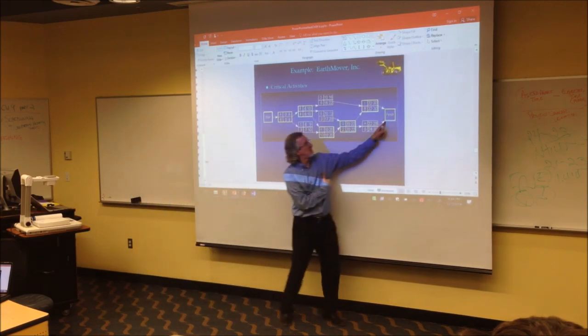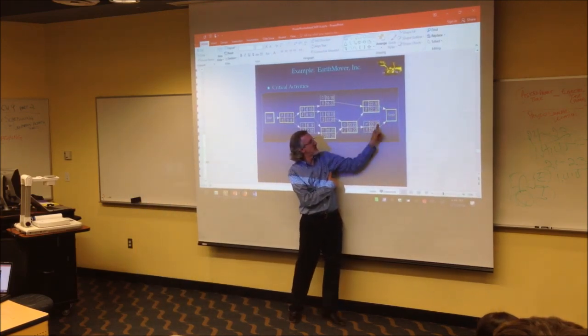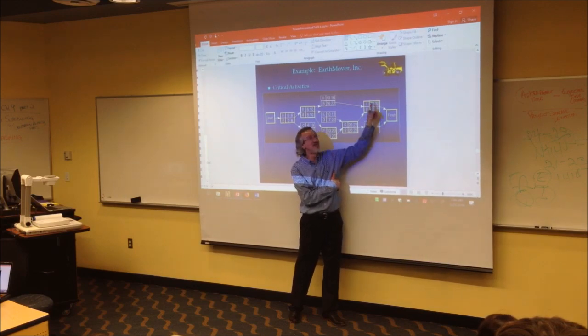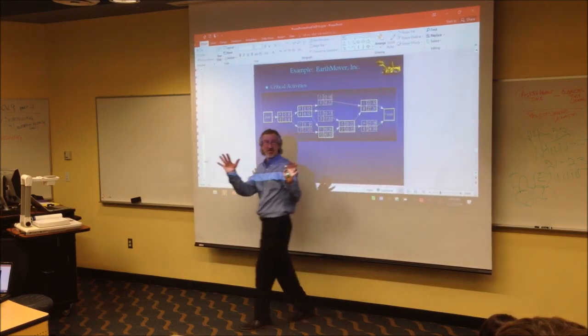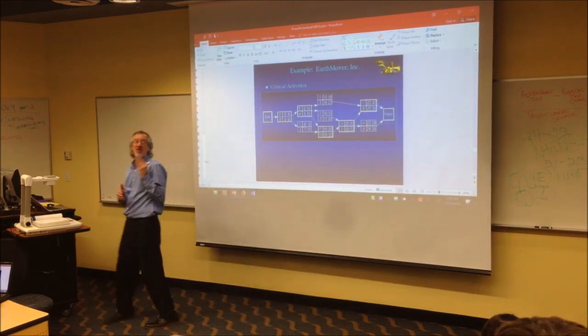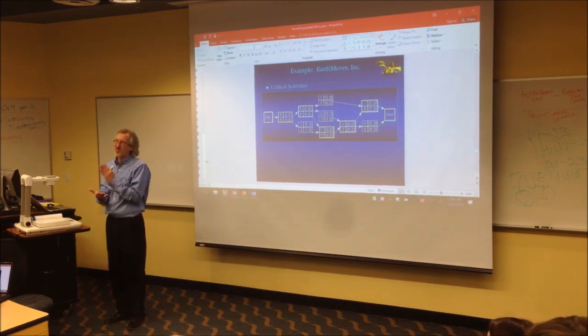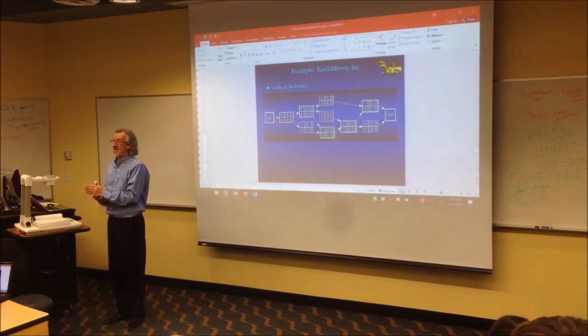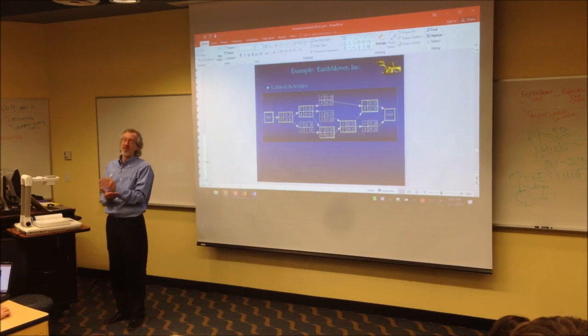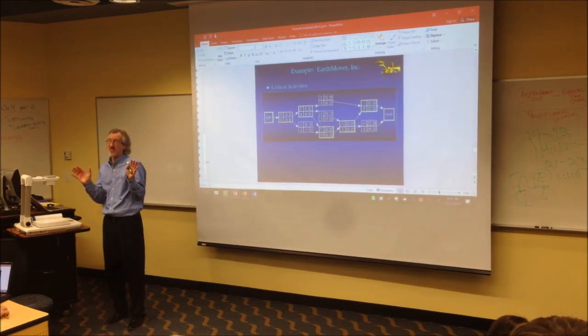So what's happening is, whichever ones go to the finish, here's the earliest finish, they both have to be done, so 30. There's the expected amount of time. The company said, we need this to only take 26 weeks, a half a year. We got to cut not just 3, but 4 units of time. 4 weeks have to be cut out of it.